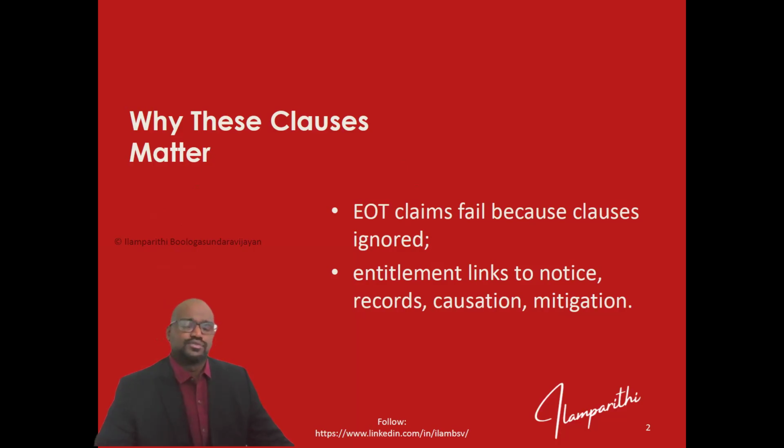Before going to the next stage, if you are declaring a wrong clause, then your entitlement will go down. So that is where it says that it gives entitlement linked to the notice, records, what is the cause, and what are the mitigation efforts.